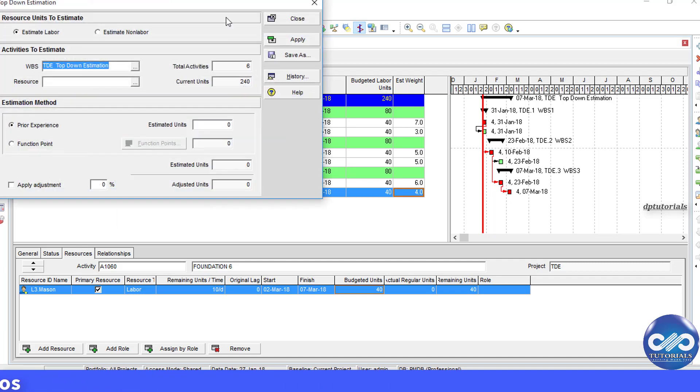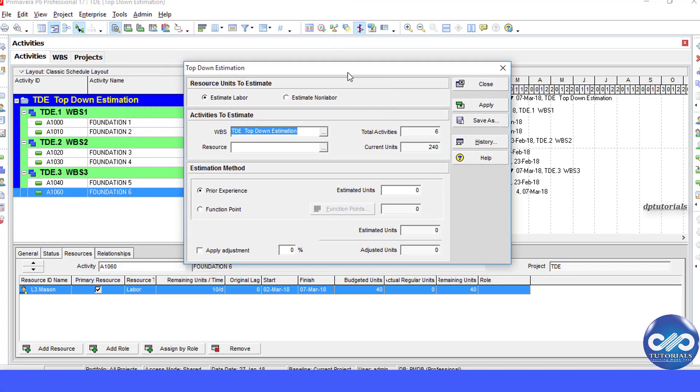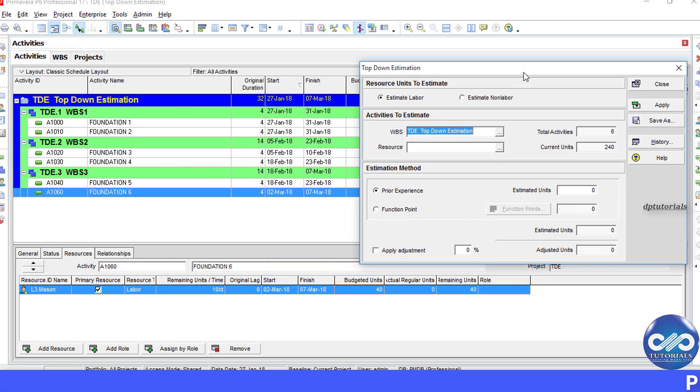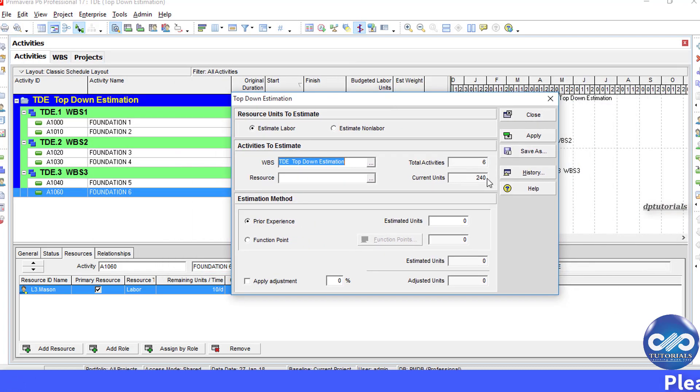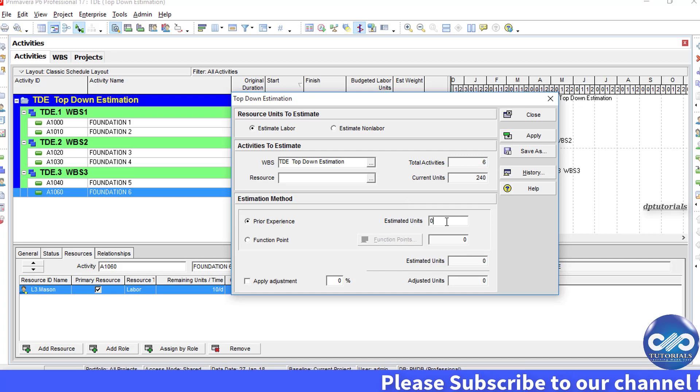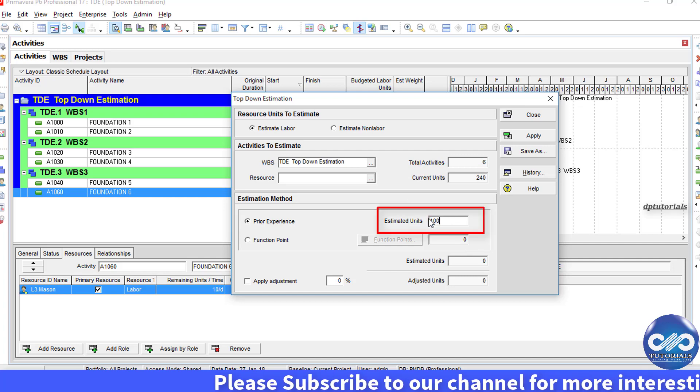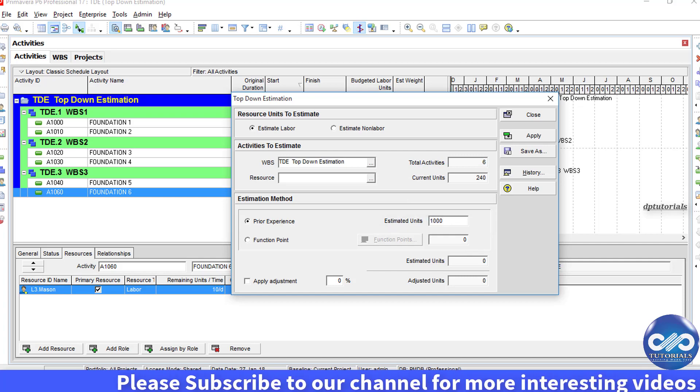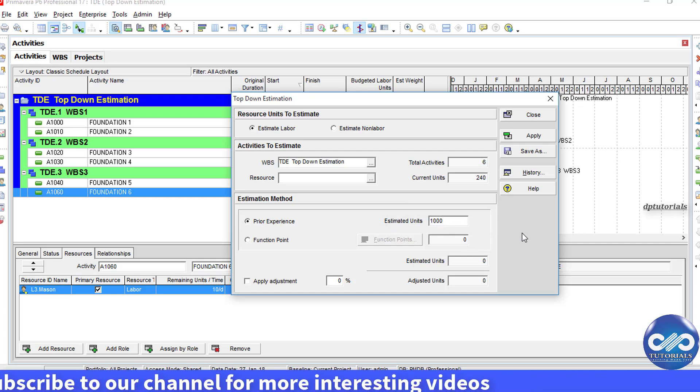Primavera will show you the current units in your project here. You can see the current units as 240. Now, you will enter the new units that you want to apply to your project in the estimated units. For example, I type as 1000.